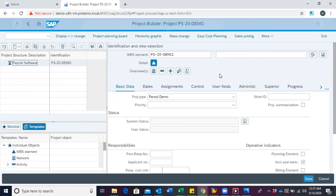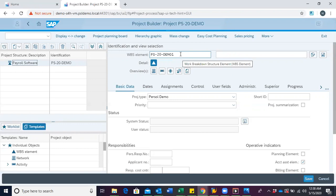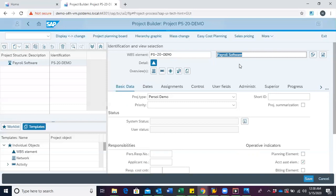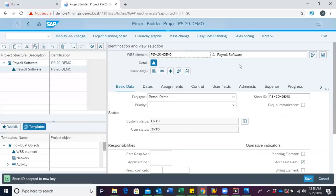We are then presented on the work area with the detail information of the WBS we are supposed to create. Since the project definition is a framework for the project, it is usually advisable that your first level WBS element has the same description and code as the project definition. So we shall use PS20 demo and then the description payroll software, just as the project definition, and hit enter. We can see from the structure tree that our first level WBS has been created.